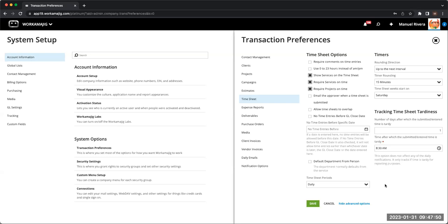So that's where it gets a little tricky, because now you're allowing your team to have that leeway of Monday through Friday, let's say. And then maybe they're submitting information that's not as accurate on a Friday when they don't remember what happened on Monday. So daily timesheets is a better way to keep them on the straight and narrow, but again, it's up to you. This one's again a little softer on what you can set up here.